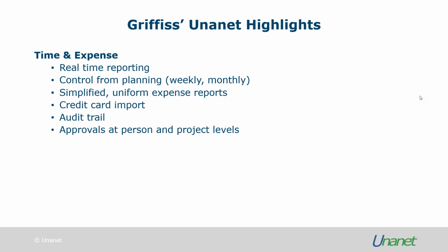And as we work through our process, we can actually assign those employees in our system to be allocated 20 hours per week. And when they put the time in on their timesheet, it will alert them if they've gone over the 20 hours, which helps us control our budget and also alerts us very quickly if there's a problem, because when someone sees a red error on their timesheet, they usually call us to find out why they can't submit it.